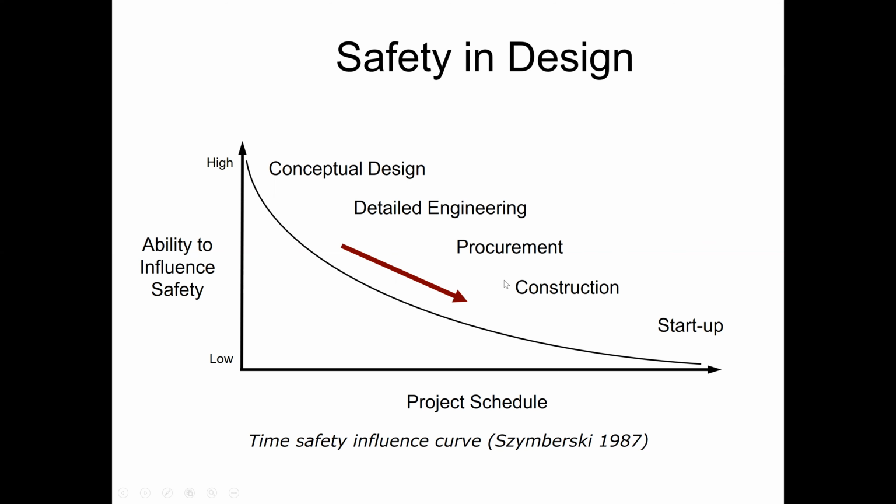Even in the procurement process and during the construction process. When the project is complete and starts up, the ability to influence safety practices decreases. Once the construction period is complete, then comes commissioning and the life of the project. So with the passage of time, the ability to influence safety decreases. Safety is important, so we should address safety during the design process.